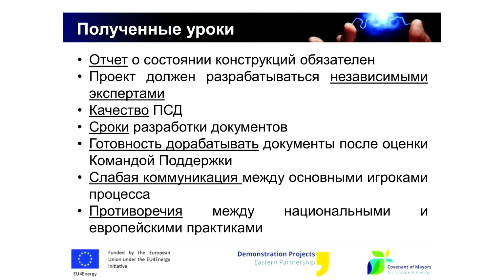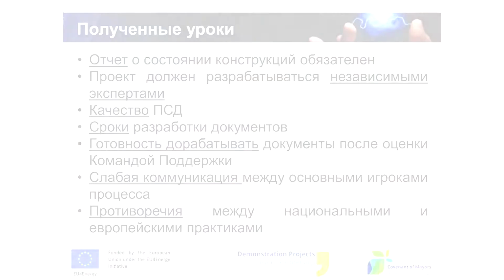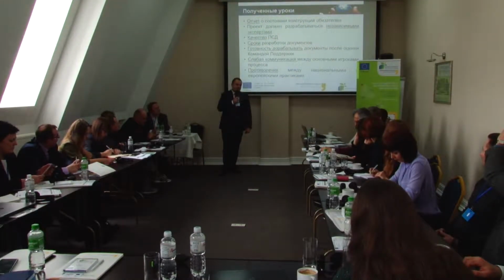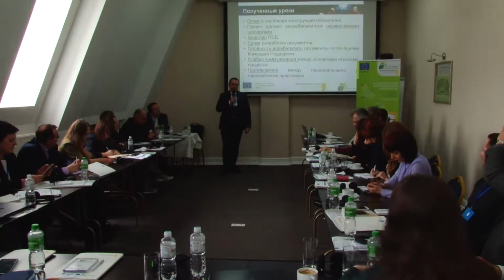The lessons learned. So let's come back to the collapsed building and suicide I was talking about. There should be a report, not should be, but there must be a report on the facility or object condition. The second point, the project should be developed by independent certified experts. The third point is high quality of technical design and bill of quantities.